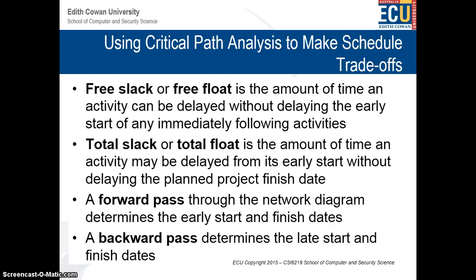A forward pass through the network diagram determines the early start and finish dates. So that's the forward pass. A backward pass determines the late start and finish dates. Alright, so that's how we do it.